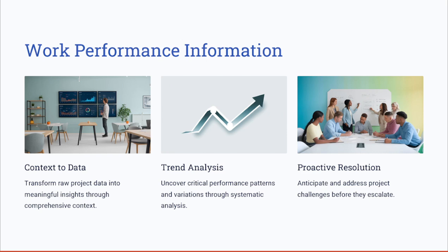You can also think of having the work performance information. It can be found by comparing the baselines, which were identified at the planning phase or based on any change requests. So start comparing, let's say, the actual data, or the raw data, that were collected during the execution with the planned phase. Based on that, you can understand the variances or the trends or patterns in the data.